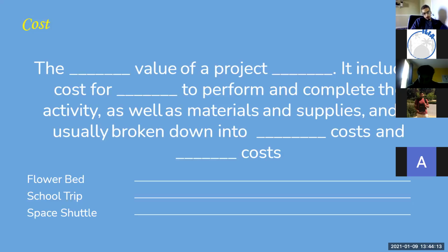So there are two types of costs on a project. There are direct costs that have to do only with the project. No one else will incur those except for the project. And there are what we call indirect costs. These are costs that are usually shared. So if your project team is sitting in an office building, it's already paid for by the company, right? It's not necessarily just for your project, but it's a cost that the business has to incur because of the project. So it gets shared across the project and other functions in the organization, other projects.